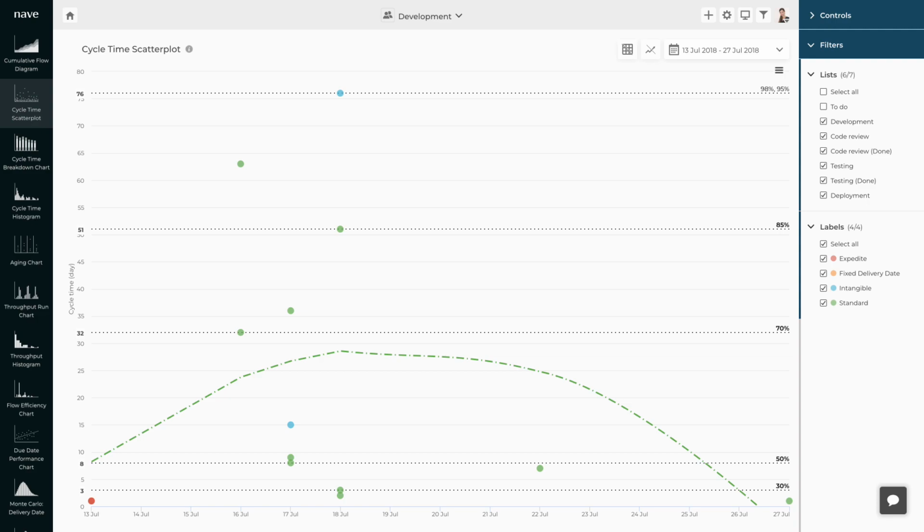The focus here should be on the items at the top of the chart, those with the longest cycle times. Pay special attention to the items with a cycle time longer than 14 days. These items have been moving from sprint to sprint. Analyze them and create an action plan to prevent this from happening again. Use Kanban analytics to streamline your Scrum events and make them more effective.